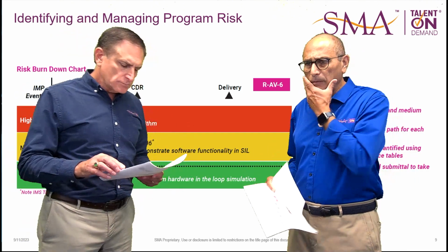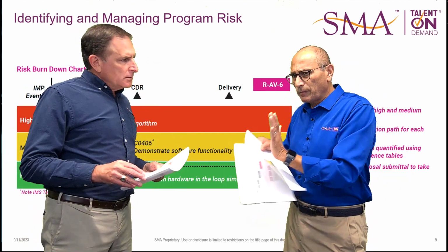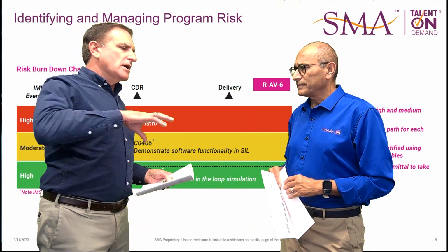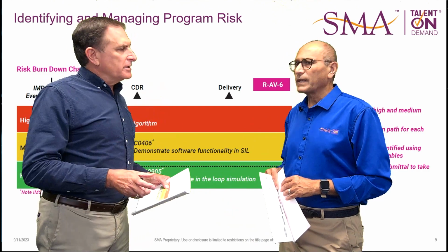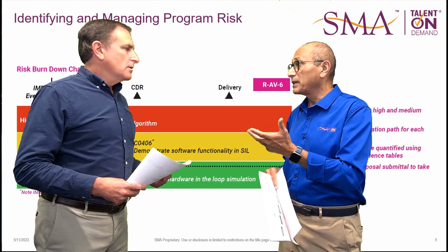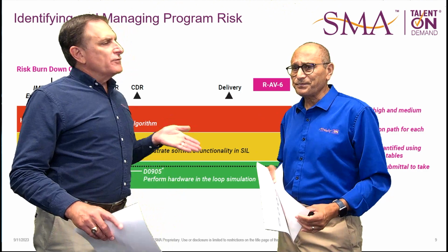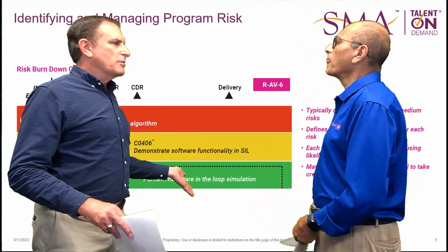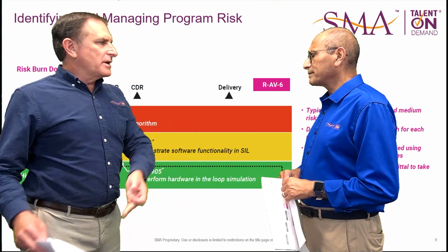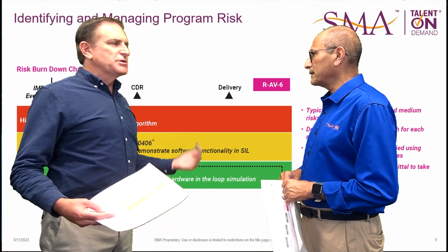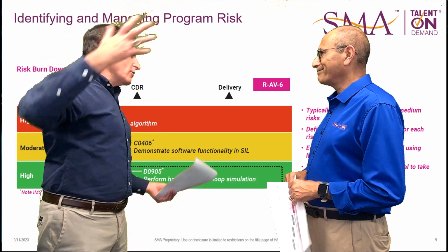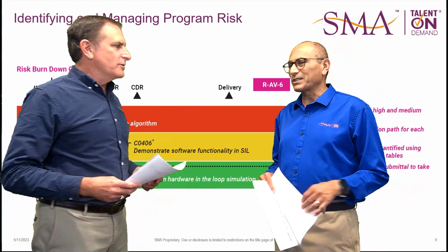Right. And I know in many proposals we do a two-dimensional view of risk. That's right. And what that helps you with is because you've got consequence and probability. Yep. So probability and then essentially criticality or consequence of the risk actually emerges. How important is it to mitigate? Because if you've got low probability of it happening and low probability of an impact, it's not a big deal. If you have low probability of it happening but a high impact, you want to be aware of it, but you're probably not going to spend a lot of time there. It's the ones in that upper right-hand corner you got to worry about: high probability and high consequence. Got it. Okay.